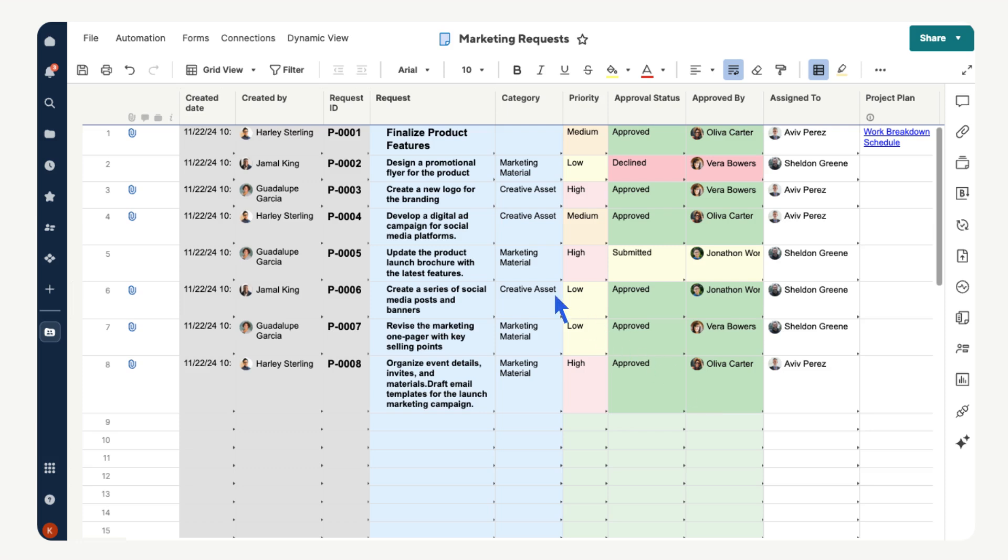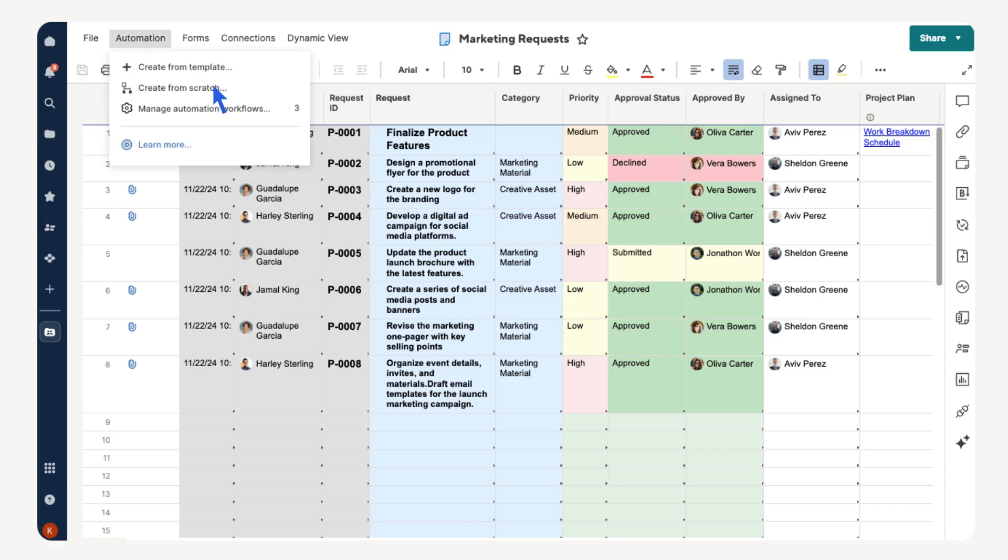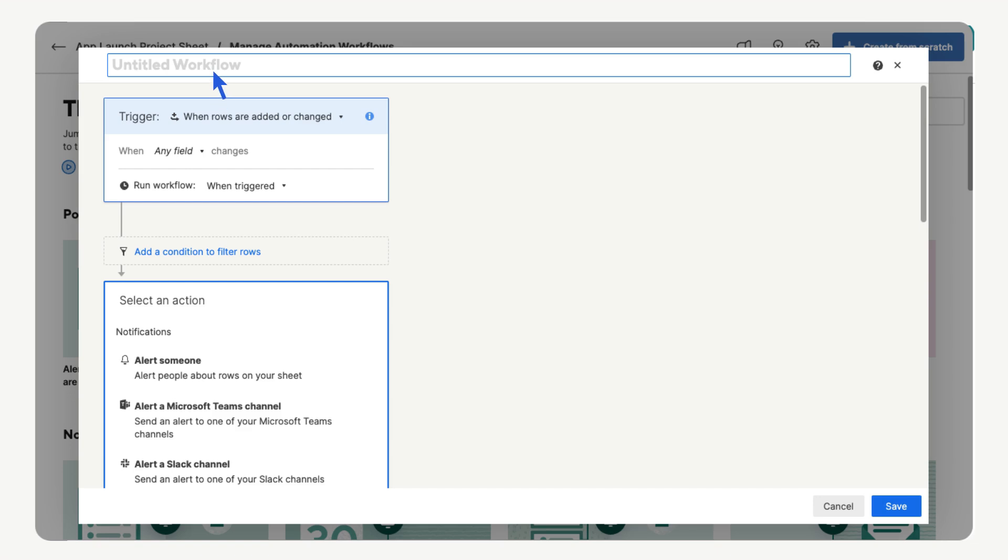Select Automation, select Create from Scratch. We can name our workflow. We want to send an approval request to the team director when a new row is added. If approved, we want to notify the project manager. If declined, we want to archive the row to a separate sheet.